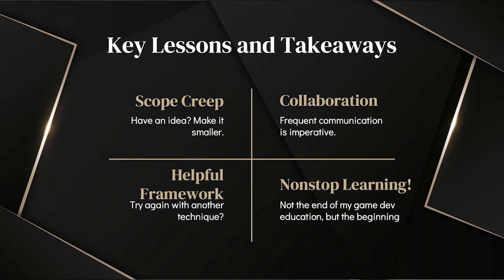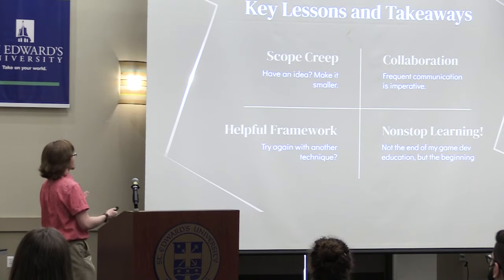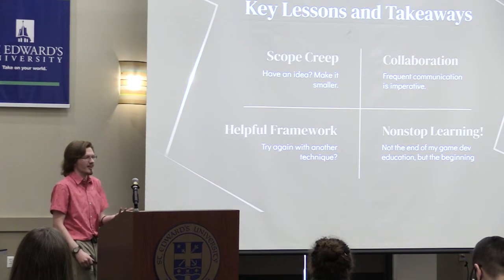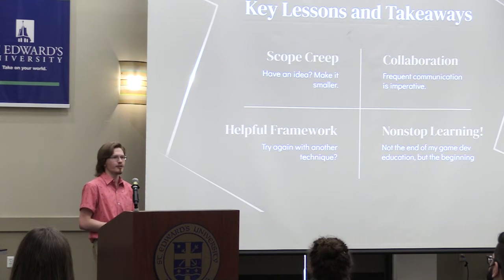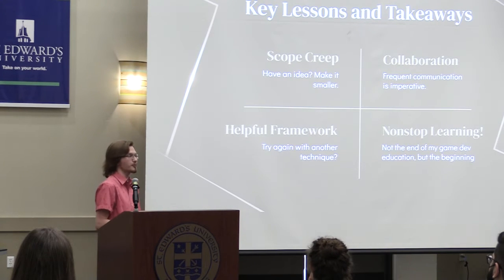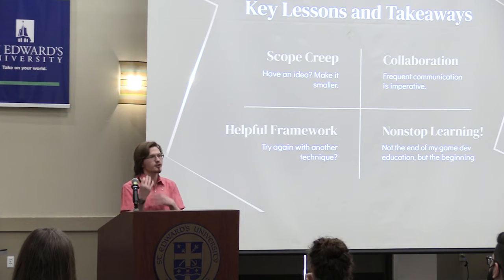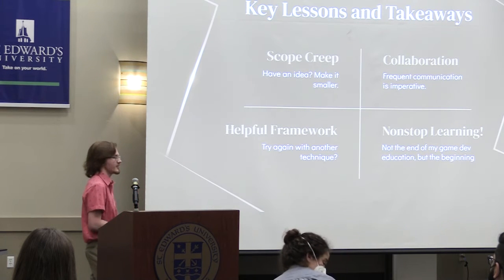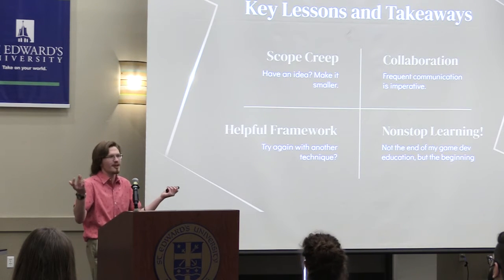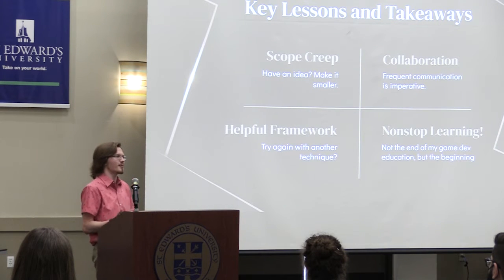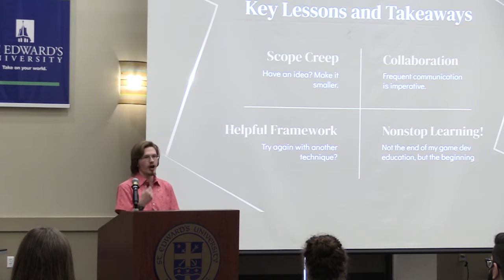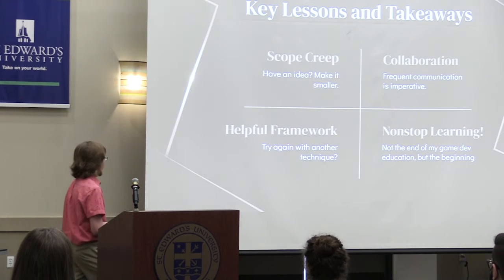So then as far as key lessons and takeaways from this project, my first was obviously, as it kind of has to be in a thesis project, scope creep. My ideas kept getting too big for the amount of time I had. I was initially planning for 3 whole areas with all sorts of different set pieces and hints and ideas. And I just ran out of time, as is inevitable. I had to scope my idea back, cut it smaller, keep only the most essential and most accomplishable parts.